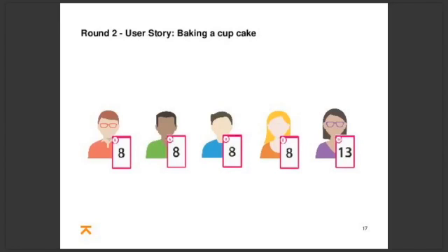And you can see we got some convergence on 8. However, the person on 13 still really wasn't happy around the cake holder point. They felt it was a risk that the specification for the cake holders wasn't known. That could lead us to buying more or less ingredients, so we could have more than was actually needed. Our costs might go up unnecessarily, and there could be wastage.